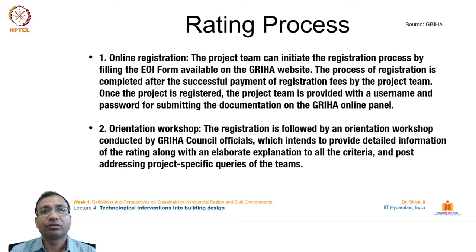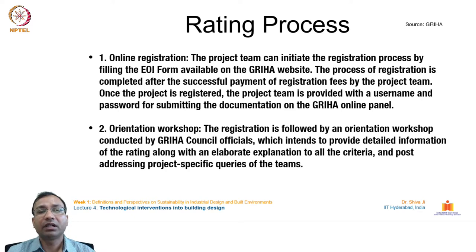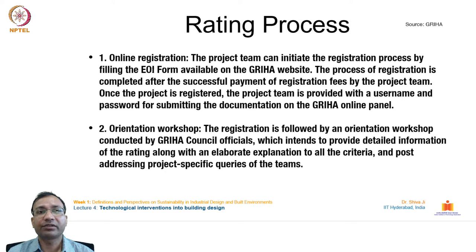The GRIHA rating process starts with online registration. The project team initiates registration by filling an Expression of Interest form on the GRIHA website. Registration is completed after successful payment of the registration fee. Once registered, the project team is provided with a username and password for submitting documentation on the GRIHA online portal.